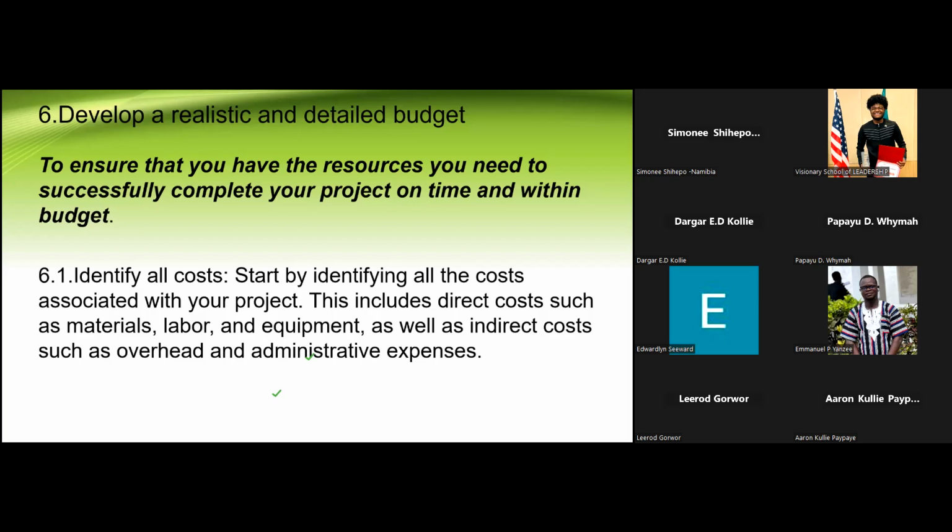So you identify all costs. How do you identify? Start at grassroots level. Work with them. Look at the reports. Look at evaluation reports. Look at monitoring reports. Look at the needs that come from them. And then you work it up in the different levels. The departments that they report to, what comes into play with budget in that department, until you have input from the bottom up. Now you use that input and take it to the table where you are planning for this project. That is how we work it out.